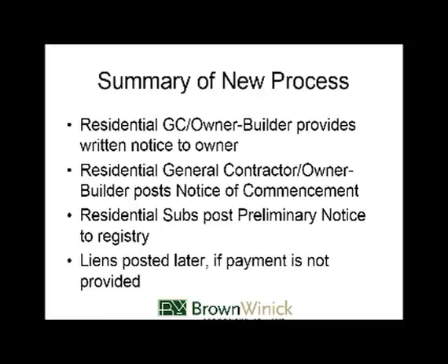You then post a notice of commencement. Subs on that residential job can then post a preliminary notice. And if people aren't paid, at that point they file their liens. That's the summary of this new process that we have and the summary of the new rules.